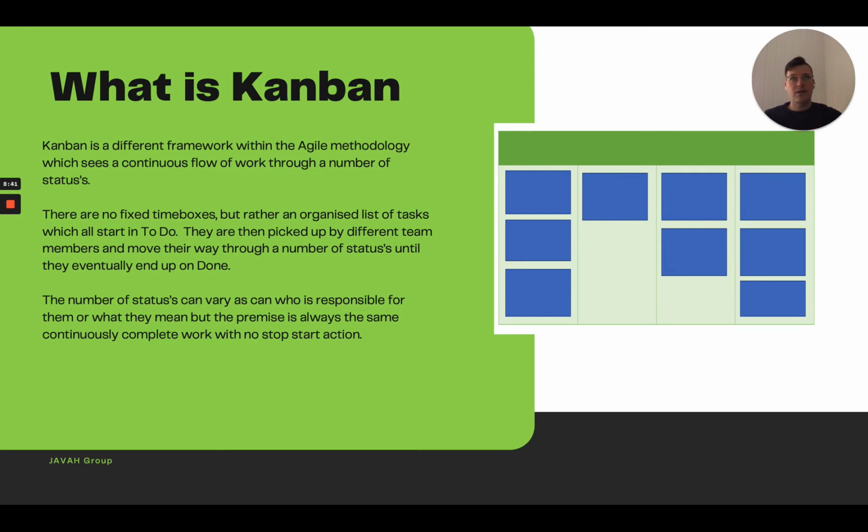Kanban, currently I'm working with a business and we're doing all of their support tickets. So anything that's in production is being run through Kanban. So it's just a continuous flow of ticket work through their support team, bug fixes and minor enhancements and improvements that are being done to the production system. While over in the new development side, what we're doing is a full Scrum iteration where we're defining the tickets.